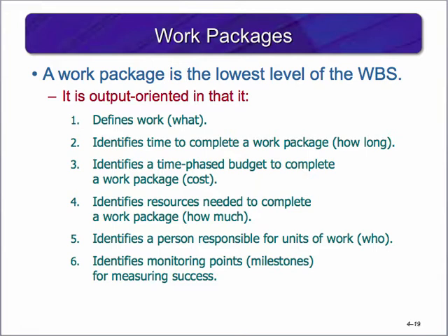Each work package defines the work to be done, the what, identifies how long it will take to complete the work package, identifies the time-phased budget to complete the work, or cost, identifies the resources needed to complete the work package, how much, identifies a single person responsible for the units of work, the who, identifies monitoring points for measuring success, milestones. Most work packages should have a duration of approximately 80 hours or 10 business days, should have a completion date, a cost, a resource, and usually technical specifications.